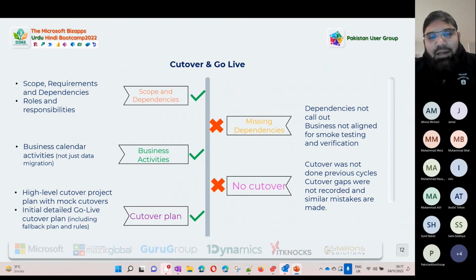And the solution architect will guide the team. He can define those cutover templates. I'm sure many of the Magic team here have worked with myself and Atif on this. The most important thing is to define those task templates, define those dependencies, and specify the time. So, for example, at 6 o'clock in the morning, you need three solutions to be installed. You define your estimated time, and then within the cutover template, if it takes about 1 hour to deploy this, then at 7 o'clock you have another team member lined up to do certain activities. But it's a combined team effort.